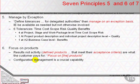Principle number six is a focus on products. Projects only exist to deliver products that fulfil stakeholder expectations in accordance with the business justification. Projects are output, not activity oriented, which means that a common understanding of the products required is defined in terms of the quality criteria against which they will be individually approved. An approach based on defined products with agreed quality criteria avoids acceptance disputes, avoids rework, avoids uncontrolled change known as scope creep, and avoids user dissatisfaction. It also aids correct estimation of the effort required from all parties for the acceptance activities.